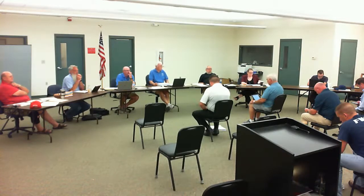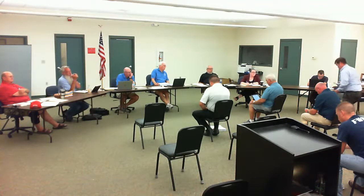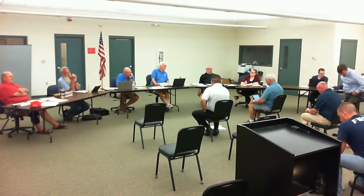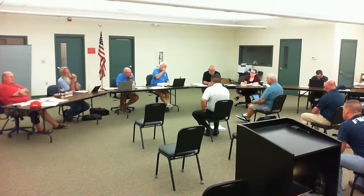Mike? Not in our case, it's just our usual maintenance type thing. But early in the year, a couple of you were interested in our bond work on changing out poles. We're starting to approach up to 300 this year, so we're doing better with the contractor also. We also changed 9 reclosers, 8 of them are in operation, because one of them had a cable fail off. But that's how we're doing on the bond this year.